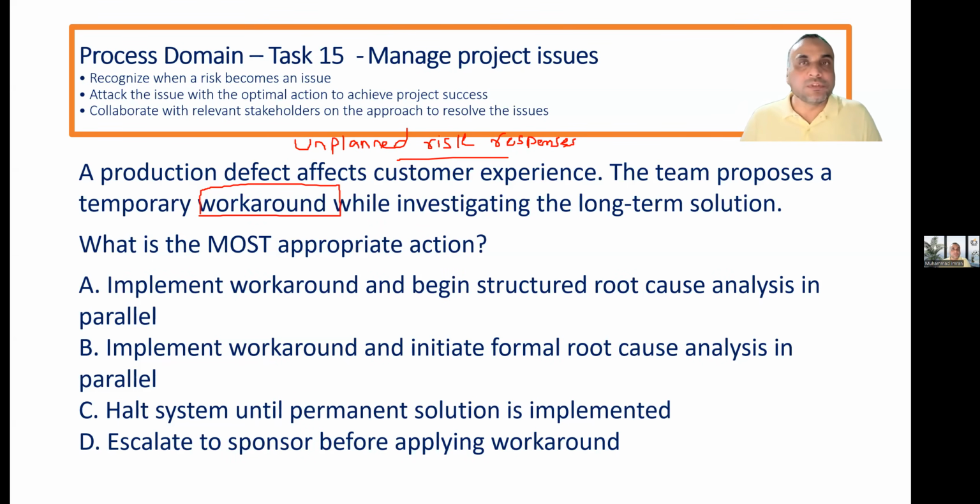When it was an unplanned risk, can you use contingency reserves? So now you learn that you must not answer things like this. If you make these types of mistakes, surely you will go for the difficult status of your exam, which is fail. So the team proposes a temporary workaround. Workarounds are unplanned risk responses. When it was not planned, it will be covered by the management reserve.